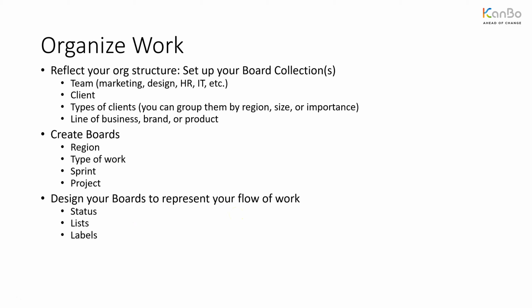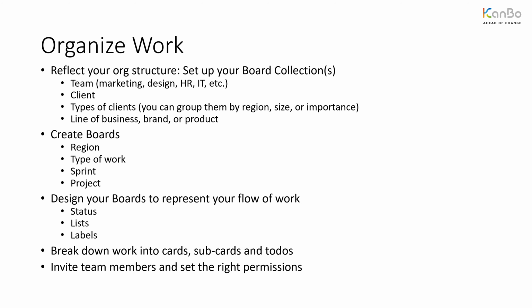After your board is set up, it's then time to create cards in the board that will represent the work that you want in this board to be visualized and worked on. Then obviously inside of a card you can break it into smaller pieces using subcards or maybe to-dos, upload the documents and so on. And once you've done this, you can, of course, do it at any time after you have created the board, invite the team members and give them the right permissions. So then the team or the people that have access to the board can start working on things there.